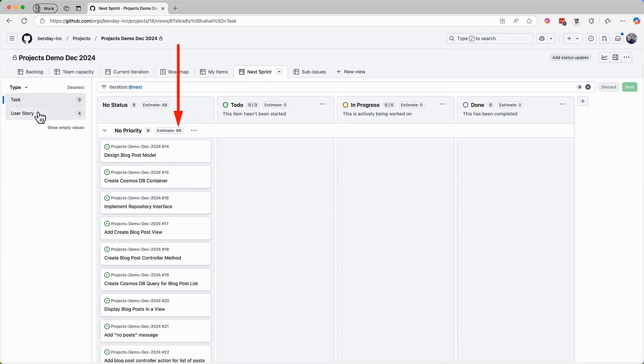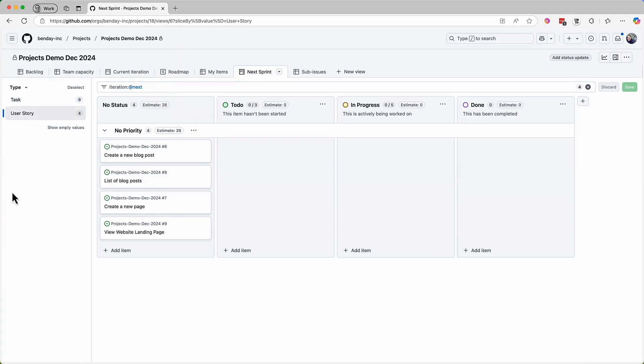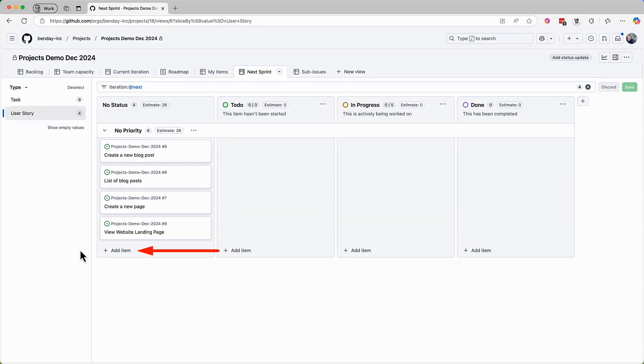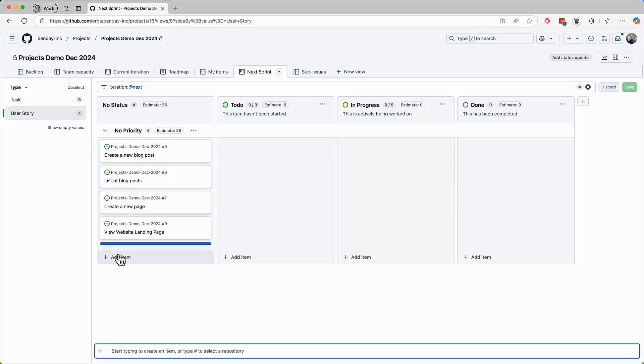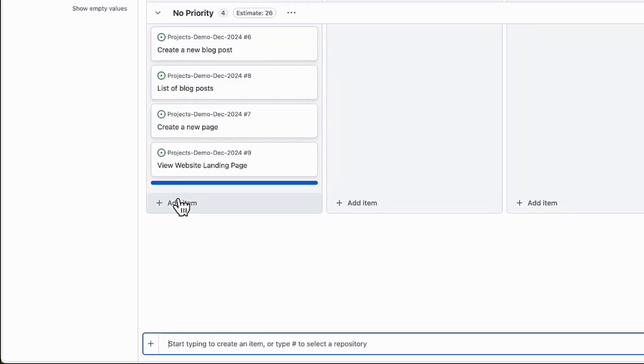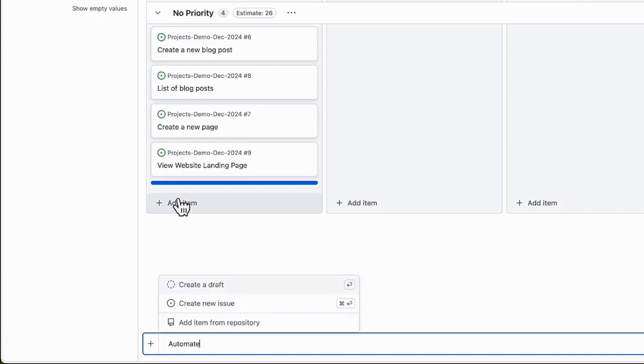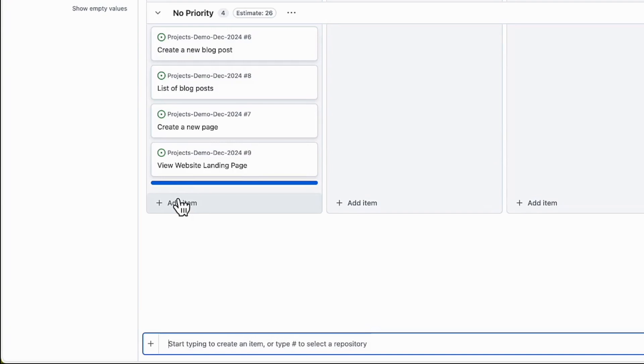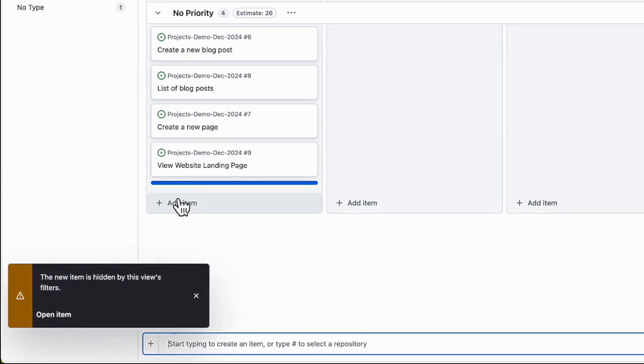Flipping this view back over to slice by user story, we can see all the requirements in the sprint. Another super common thing that can happen during sprint planning is that the team realizes that they need to add a completely new PBI to the sprint. To handle that scenario, there are these little add item buttons at the bottom of each column. And when you click on that, you get this input box at the bottom that lets you create new items. Let's say that the thing that we've noticed is that we really need an automated build for our project. So I'll type in automated build using GitHub Actions.